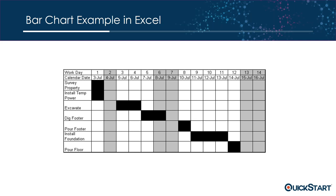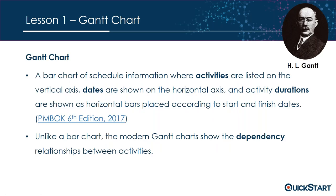I created a bar chart example in Excel. You can see your activities down the left-hand side, your dates across the top, and the duration for each task is depicted by the length of the bar. That was the definition — now you see an example. But remember, we are talking about Gantt charts, so unlike a bar chart, the modern Gantt chart shows the dependency relationship between activities.